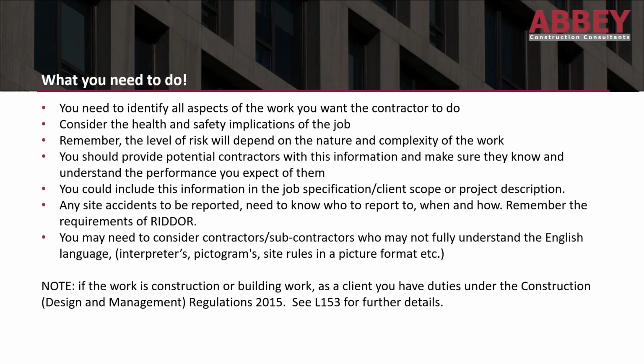Is that within 24 hours of the accident happening, and does he want that as a printed copy of the RIDDOR regulation, or an email, or a text message, or a phone call? So all that has to be set out in advance for it to work smoothly once the work commences on site. You also need to consider any contractors or subcontractors who may not fully understand the English language.